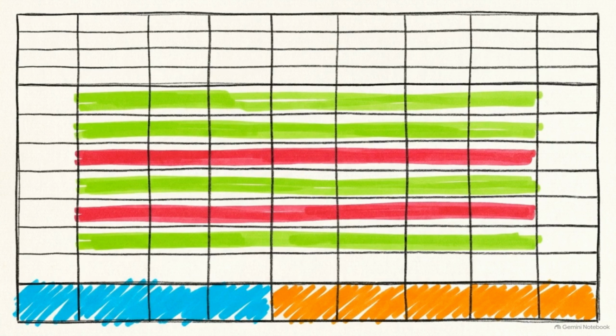Apply conditional formatting data bars to these cells, but select entirely distinct colors, like blue for completed and orange for remaining. Individual metrics are useful for daily execution. Isolating these macro averages in distinct colors provides the high-level perspective needed for overall project oversight.